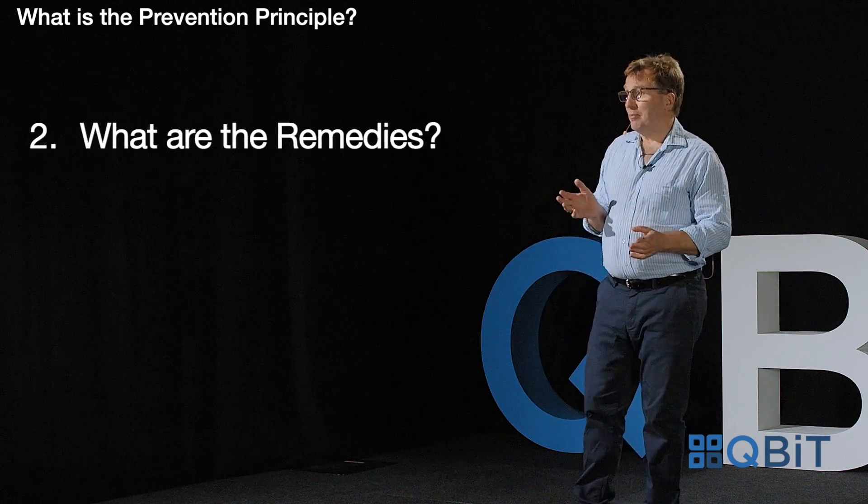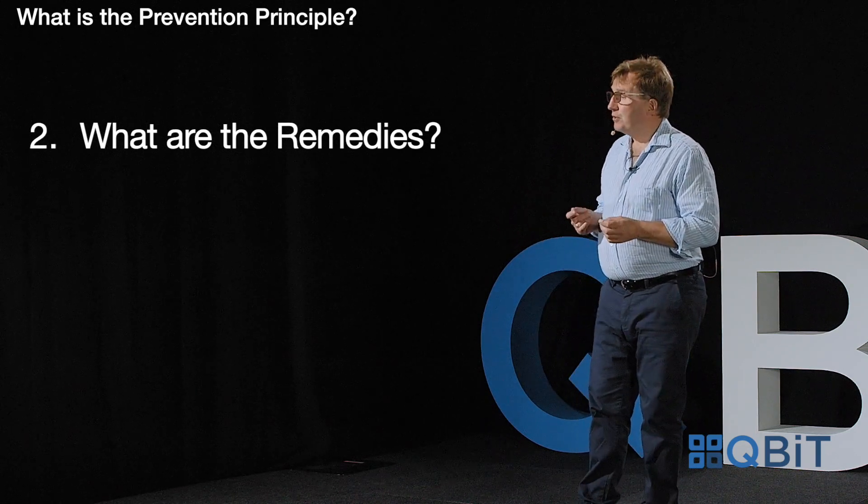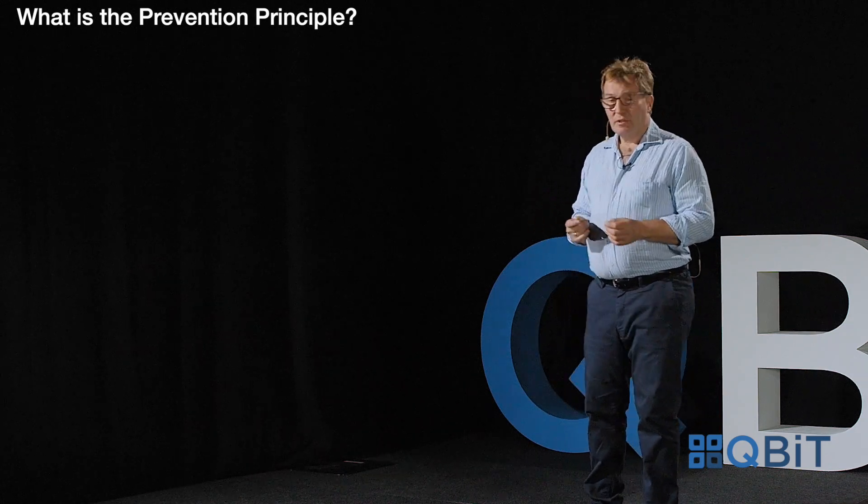What are the remedies you might be looking for? First, the defensive remedies. Very often the prevention principle is being used to prevent the other party relying on an act of default to terminate the contract — in other words, to suspend or prevent the operation of a right of termination. Alternatively, you may be looking to suspend the running of time or postpone a deadline, and with it any obligations, for example, to pay liquidated damages.